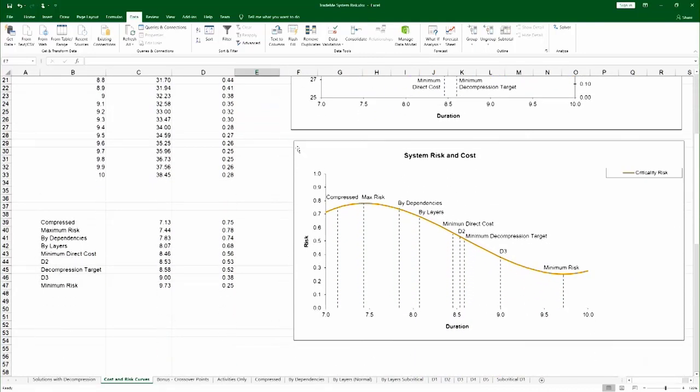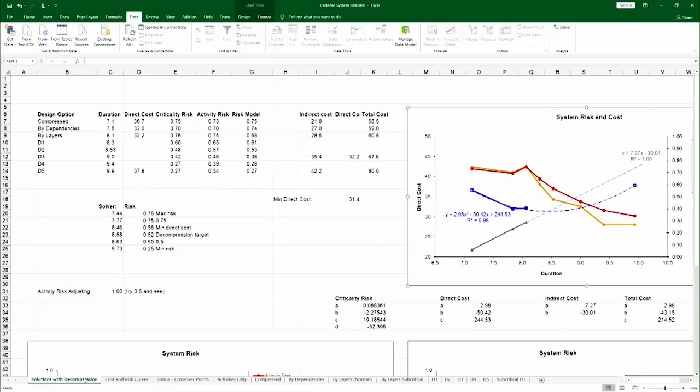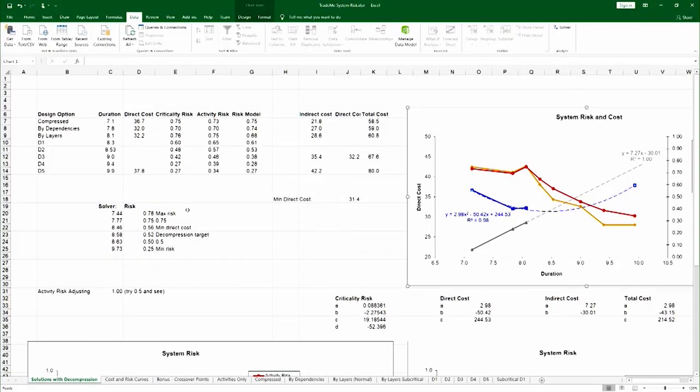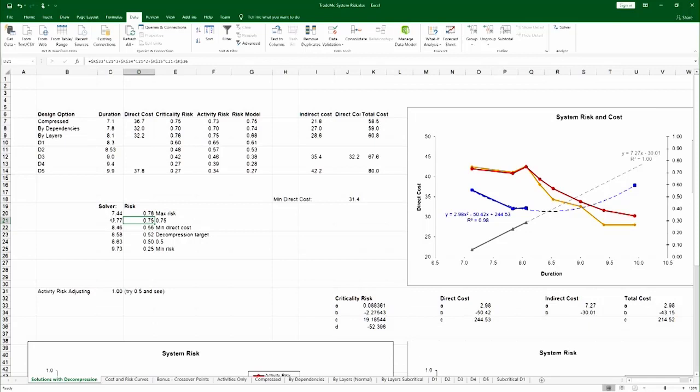You see here the risk curve, the model of the risk curve with the various solutions. And the spreadsheet also uses a solver to find some interesting points. For example, the point of max risk and the point of 0.75 risk. This is done using a solver.